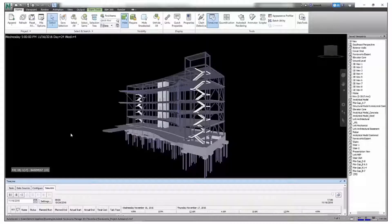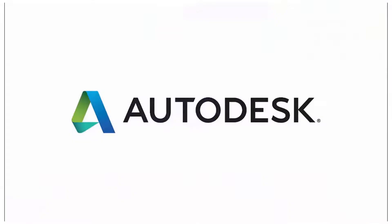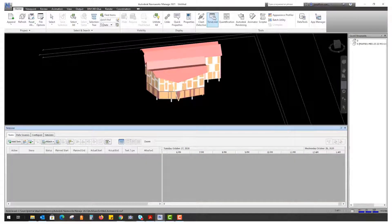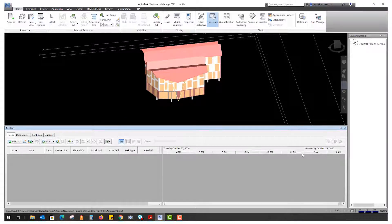Actual and planned dates can be associated with the tasks, simulating actual against planned schedules. To first set up a Timeliner, you want to enable it in your user interface — it will pop up at the bottom of your screen — and you need to do something called adding tasks.